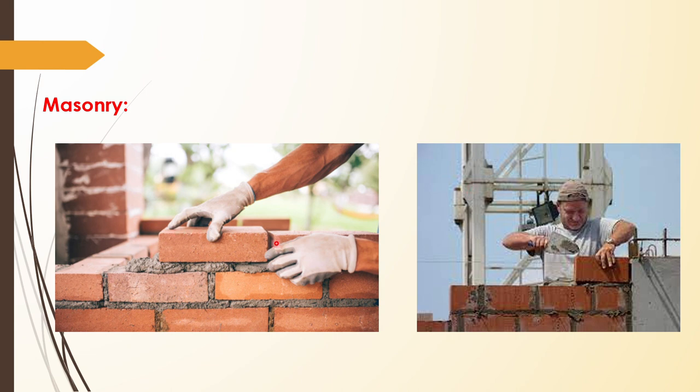So if you are doing the superstructure masonry work, if there is a ventilation here, it means the entire volume minus the volume needed for ventilation we will take for masonry work.